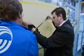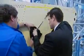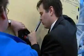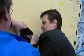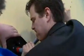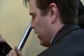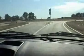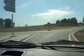to assemble the first fin within a reasonable time, but in fact we encountered problems which delayed the assembly, and to worsen the situation, the lead time was shortened. So we ended up with a lead time that was nearly half of the original lead time we planned. The fin was delivered on time, but it wasn't completely finished. Christian has had to move to France to continue the work.